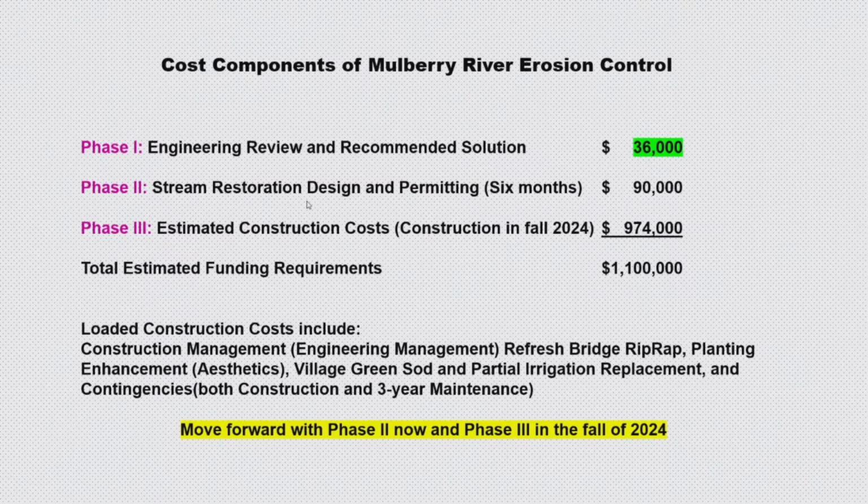I know there have been numbers floating around like it costs $600,000, and in addition to $600,000, a third to a half in contingency for the next 3 years for plantings that don't grow and things of that sort. The $600,000 is a direct cost for the primary contractor.